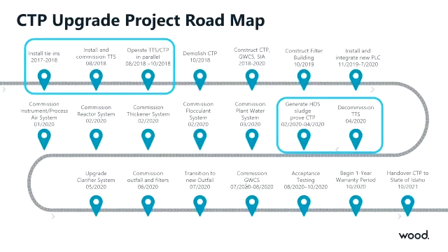the main work area. And in total, this was about a 4-year project, which included a lot of the upfront design, operations, commissioning the new system, and then a 1-year O&M period and handover to the Idaho Department of Environmental Quality.